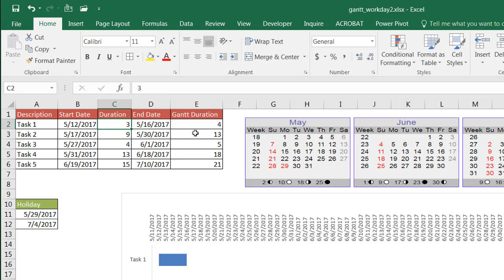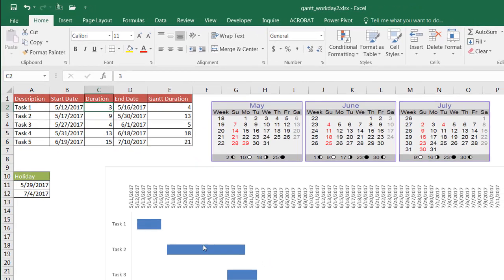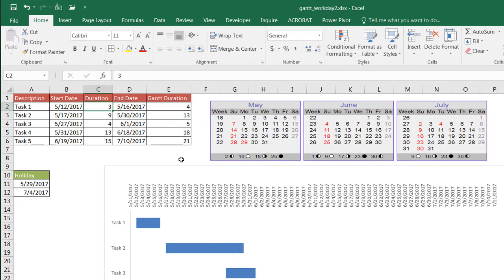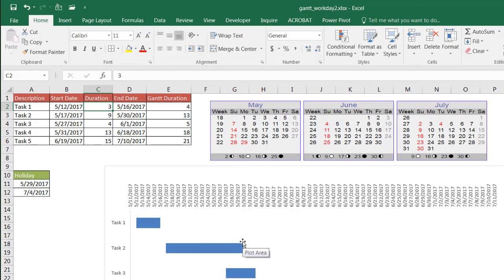But for the Gantt duration, it's going to be 13 days. So it needs to count from 5/17: 1, 2, 3, 4, 5, 6, 7, 8, 9, 10, 11, 12, 13, right? To chart this out, it can't count nine days. That's why it ends here at 5/30. So this particular Gantt chart will visually represent it more correctly. So how can we do this? Let's start from scratch.